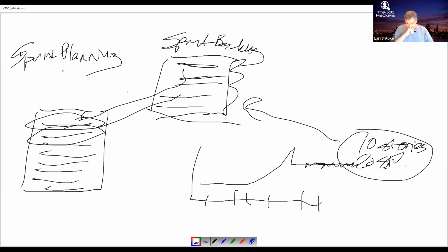And then normally we say on a scale from 1 to 5, because we're on Zoom now, type it in the chat. How confident are you about this plan? Because the goal of the sprint plan is to take as much as you can take and nothing more.